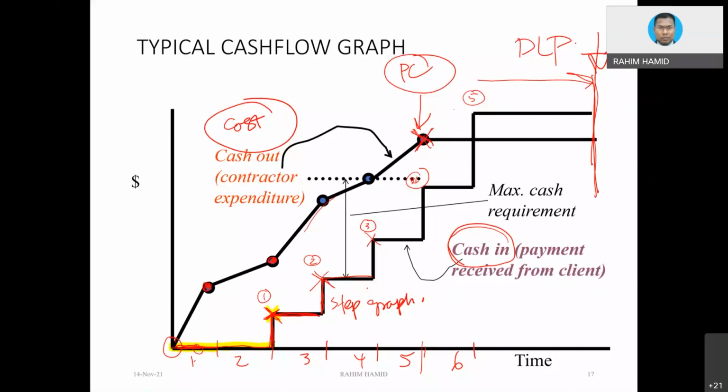And the line will continue, okay? It continues in terms of the mathematics, because the issue is that you do not close your account yet. Only at the end, only after you get your final payment, then only are you going to see. You notice that the difference between this and this is what we call profit.